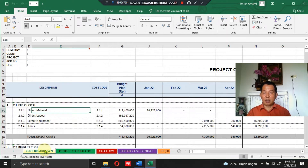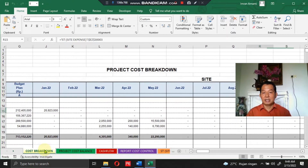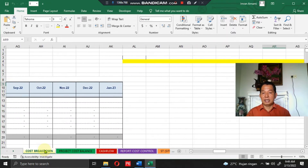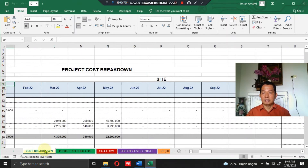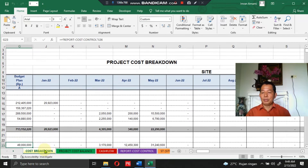In the project cost breakdown section, you will see the comparison between the budget plan and the project cost incurred during the project, divided into two classifications: site office and home office, for one year of project operation.